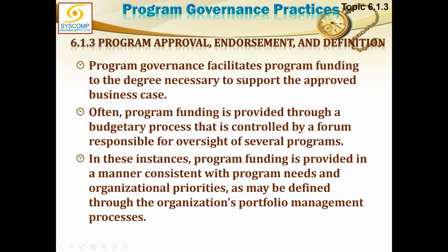Program governance facilitates program funding to the degree necessary to support the approved business case. Although the business case does describe what funding and from where this funding is going to be coming, naturally that is just a preempting kind of a study. That is just a kind of a feasibility. It is not exactly identifying the actual funding source. It may be an indicative kind of a thing that funding may be coming from this direction. But now, when we are actually starting the work, this has to be finalized.